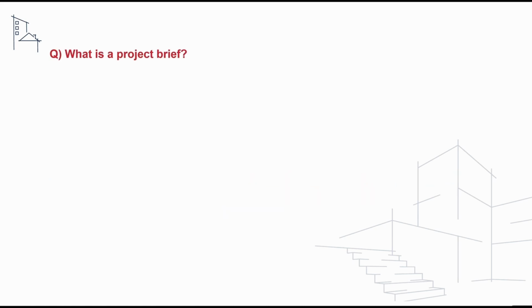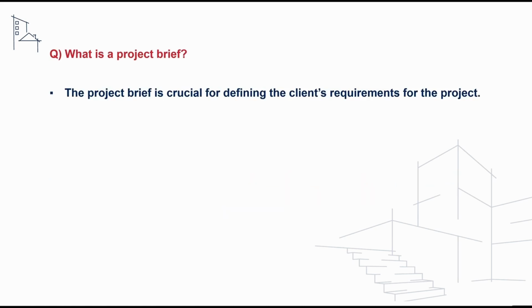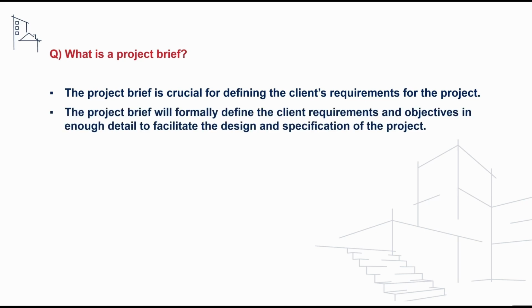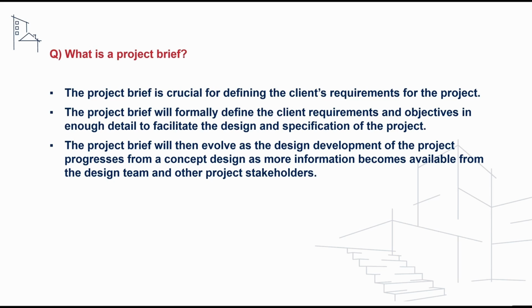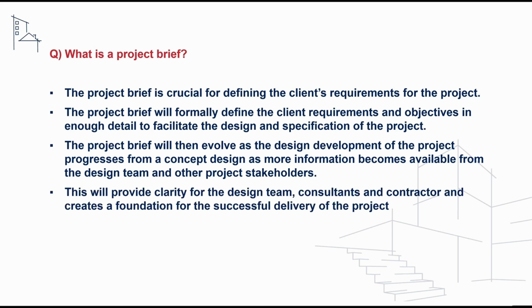The next question we'll take a look at is what is a project brief? And to address this, we can say that the project brief is crucial for defining the client's requirements for the project. The project brief will formally define the client's requirements and objectives in enough detail to facilitate the design and specification of the project. The project brief will then evolve as the design development of the project progresses from a concept design as more information becomes available from the design team and other project stakeholders. This will provide clarity for the design team, consultants and contractor and creates a foundation for the successful delivery of the project.